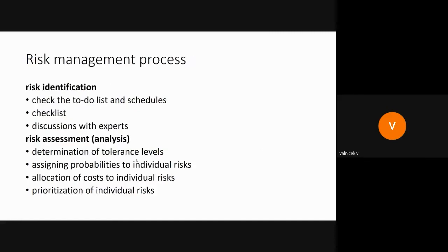Risk identification. Check the to-do list and the schedules, or use the checklists because probably your project is not the first same project. Discuss with the experts. Risk assessment.